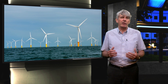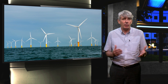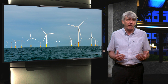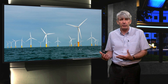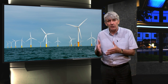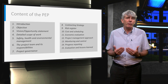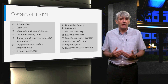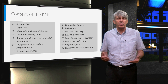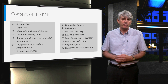In order to be a complete project plan according to industry standards such as PMBOK and PRINCE2, the project plan must also describe the execution, management and control of the project. This information can be provided by referencing other documents that will be produced, such as the procurement plan or construction plan, or it may be detailed in the project plan itself.